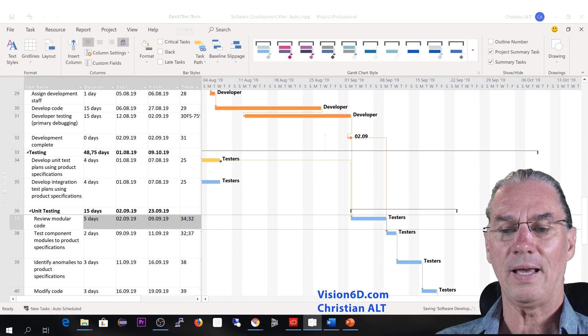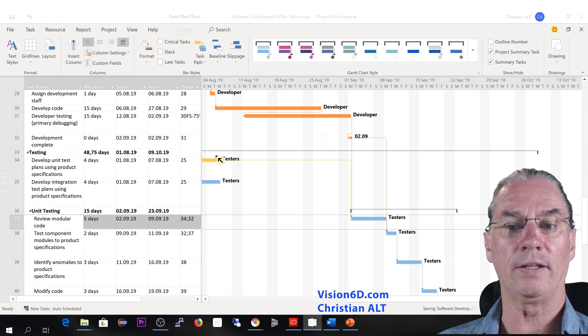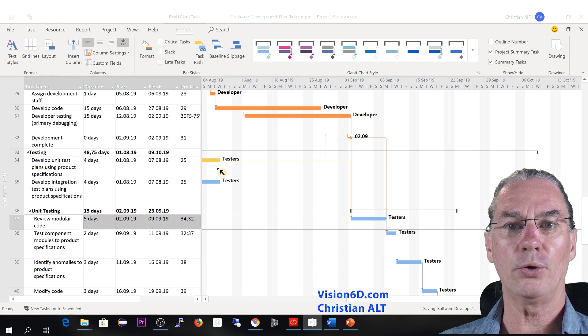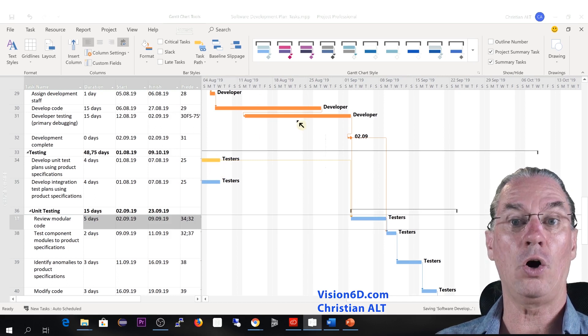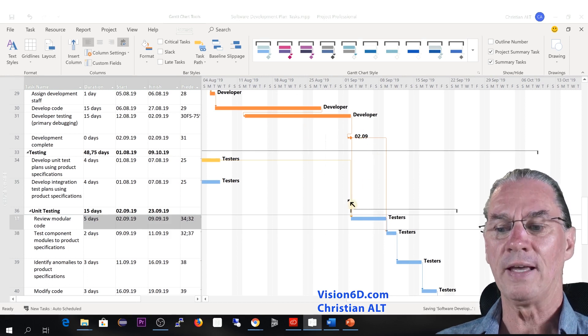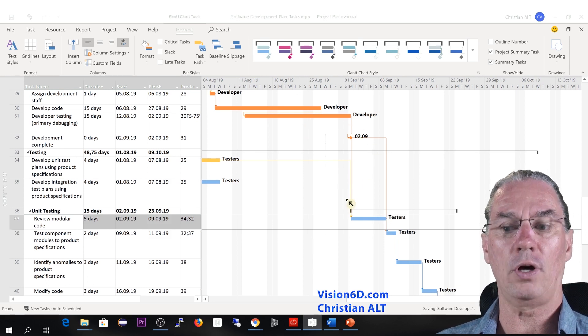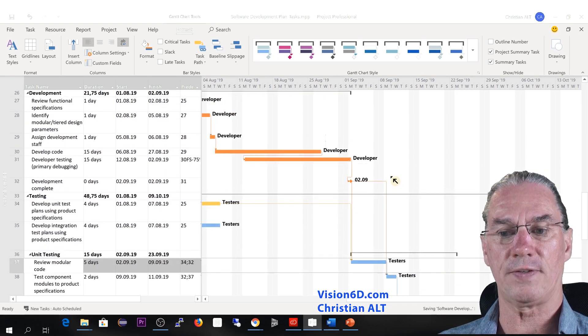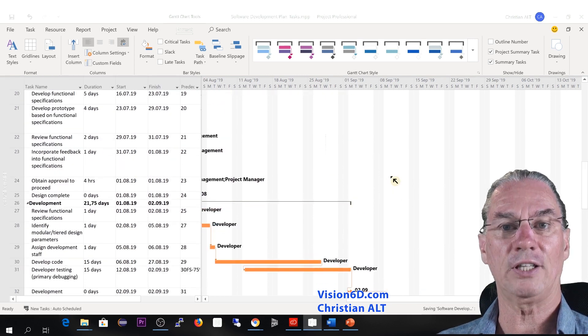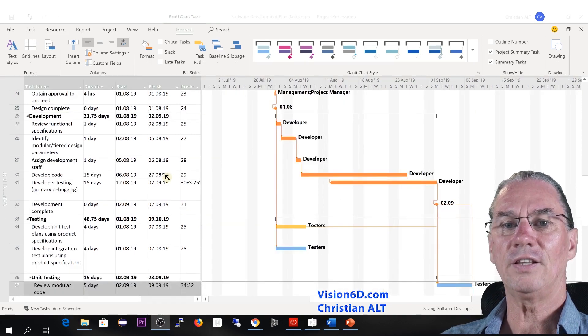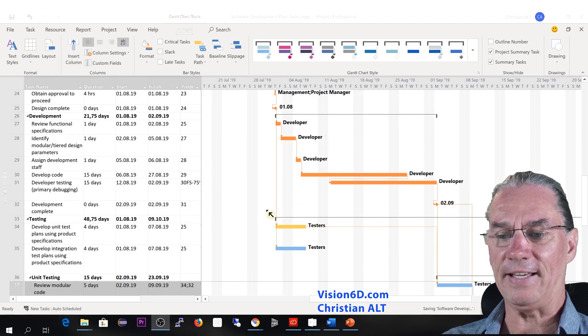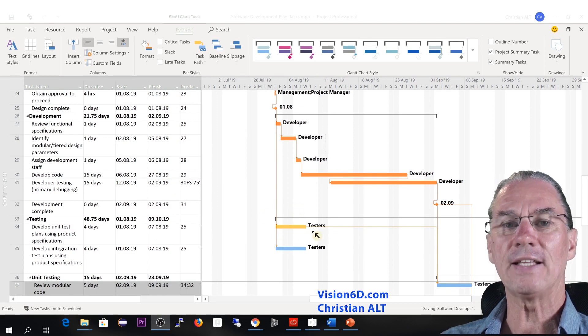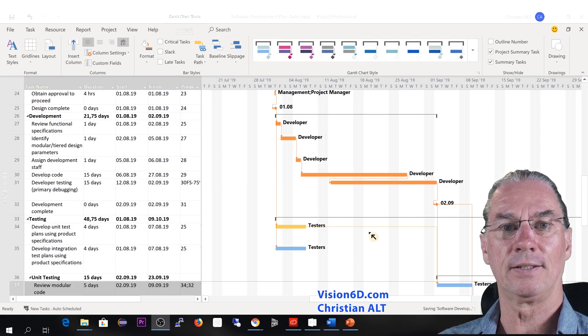And you see that we have predecessors that are in clear yellow here. But we have other ones that were marked as orange. Those are the driving ones, which means the schedule of the task depends on those orange tasks, which are the driving tasks. The tasks that aren't on the driving paths like the one here, it's because they have some margin or some slack.